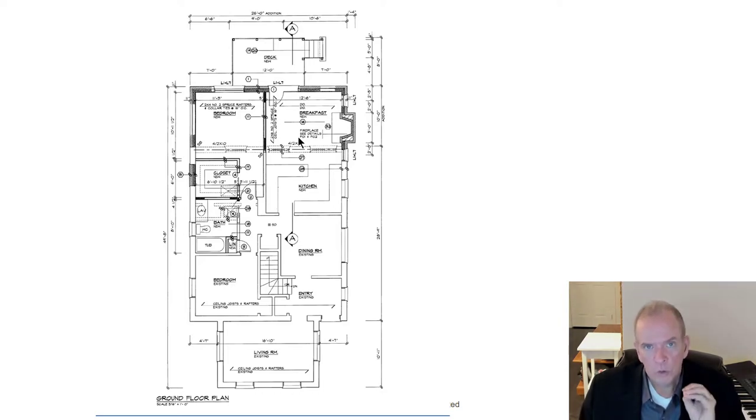You've got to have good contingency management in your pricing model for renovations, because there will be things that you either didn't allocate properly for or enough for, and that can very quickly mean that you're working for nothing on this project. So things really do take a lot of time and effort with renovations. And you have to remember too, you're typically working in somebody's house, and you have to have a lot of respect for the house that you're working in and the people that you're working for. There are a lot more interactions that occur in that respect.